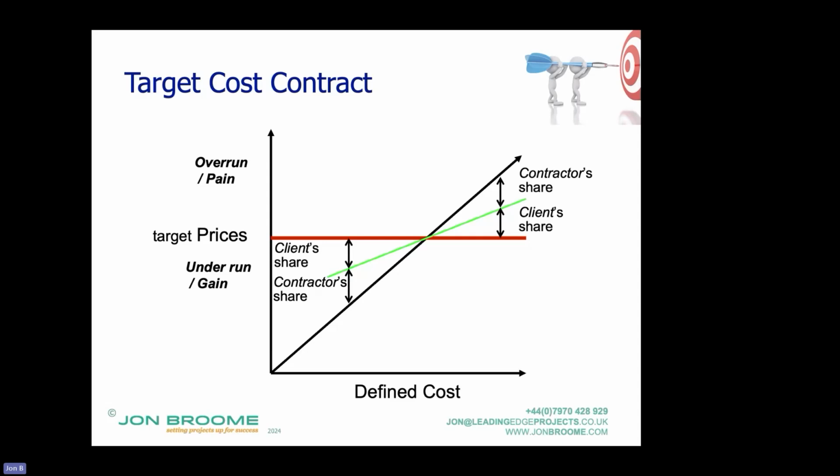Under option C and D, and we'll come to the differences in a moment, it's the fulcrum around which the incentive mechanism operates. Under all those options, the prices is adjusted by compensation events, pretty much the same compensation events, with the same process and the same criteria for adjustment.